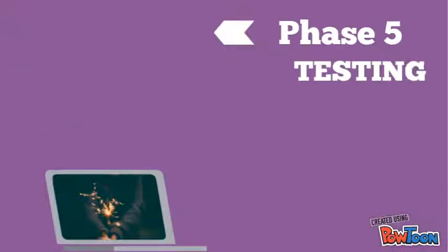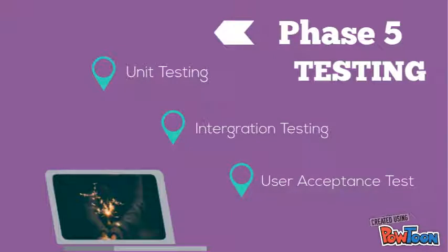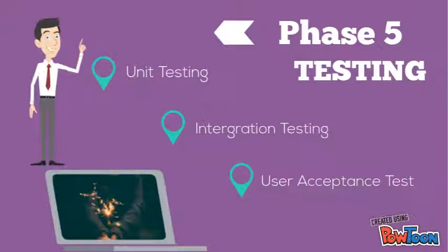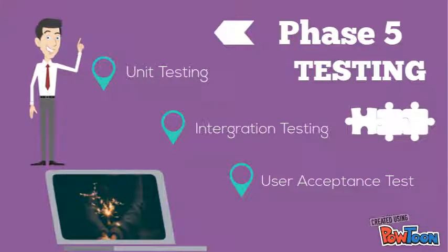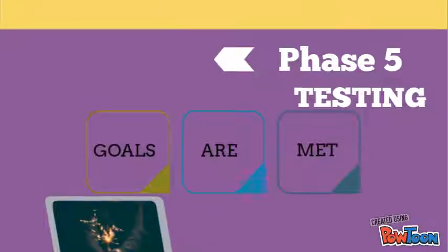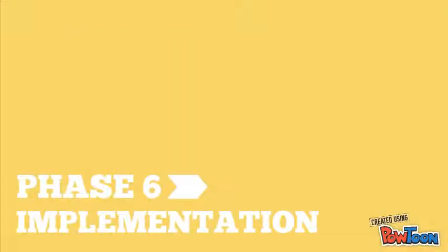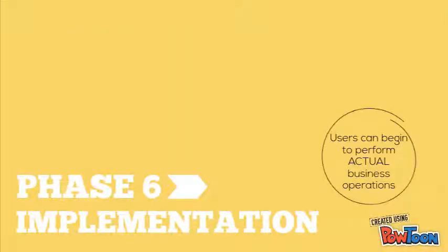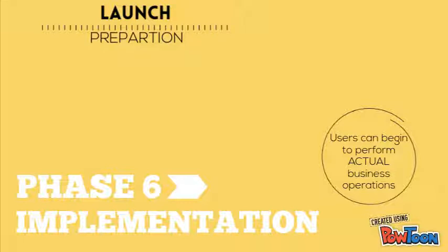The fifth phase is testing, which involves system integration and testing of programs and procedures, normally carried out by a quality assurance professional. All project pieces are brought together into a special testing environment to eliminate errors and bugs, in order to determine if the proposed system meets all of the initial set of business goals defined in the analysis phase.